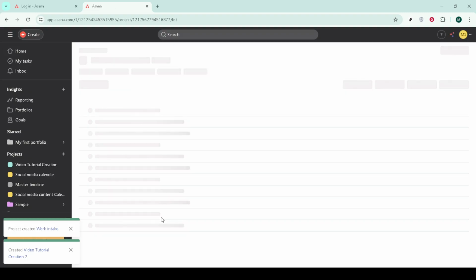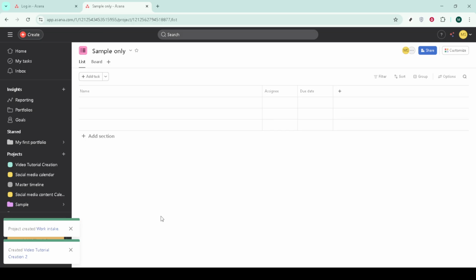Backlog holds raw ideas and requests. To refine is where you clarify scope, acceptance criteria, and dependencies. To sprint is your short list of work that's ready and eligible for the next sprint. In sprint is the active work you've committed to. Done is completed work, which you'll keep for history.